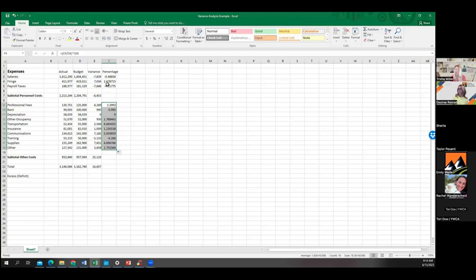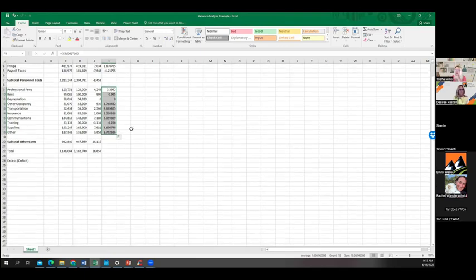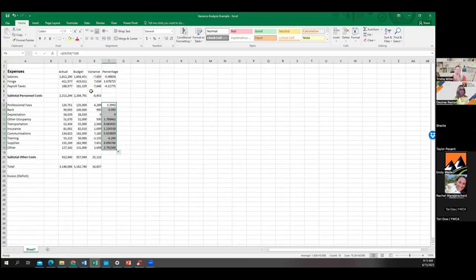And if we look back, here's the other thing, payroll tax, right? Notice though, what we didn't mess up was the fringe, right? We actually were a little over that, right? So remember the other day, we talked about how we make mistakes with the fringe. We did okay there. We still have a little bit of an adjustment to make, but the payroll taxes is what got us. We did spend more in salaries. So of course it makes sense then that our payroll taxes are going to be off, but we had budgeted more for the payroll taxes that should have covered most of it, and it didn't. So those are our areas that are sort of concerning at this point. So the largest one, again, overall is training, but dollars wise, the one that we're losing the most on is actually up here. The salaries, even though it's only 0.49% because we spend so much here.